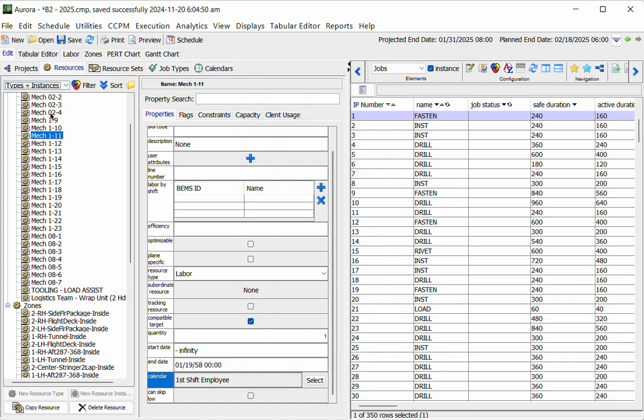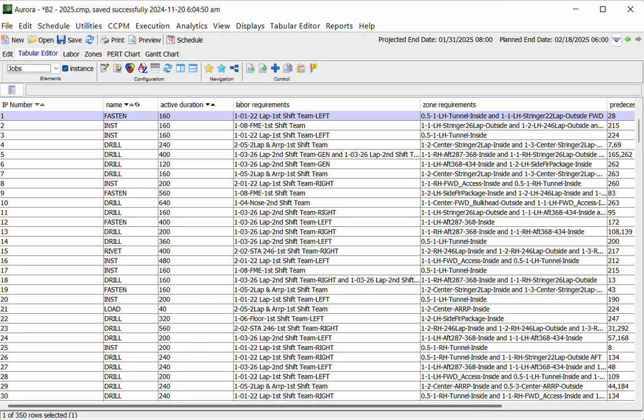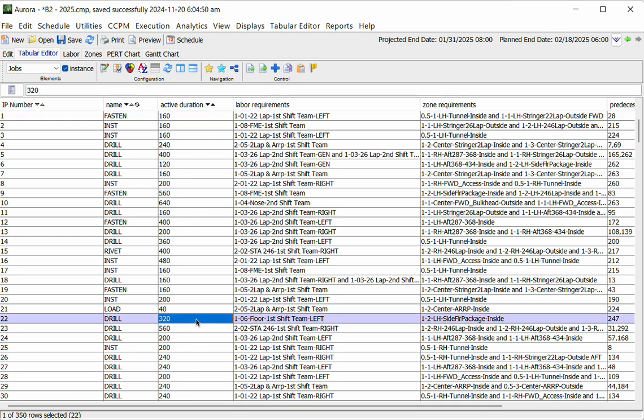Now, what the scheduling does is basically it goes through, lays in all of the jobs or activities automatically, and what that means is it figures out timing that will honor any precedence information, the duration information, any other timing restrictions from calendars or shift relationships, and the resources are available. So it is doing resource-loaded scheduling by default.